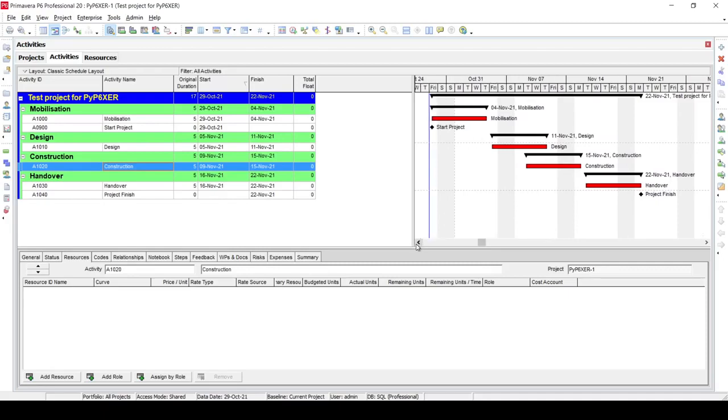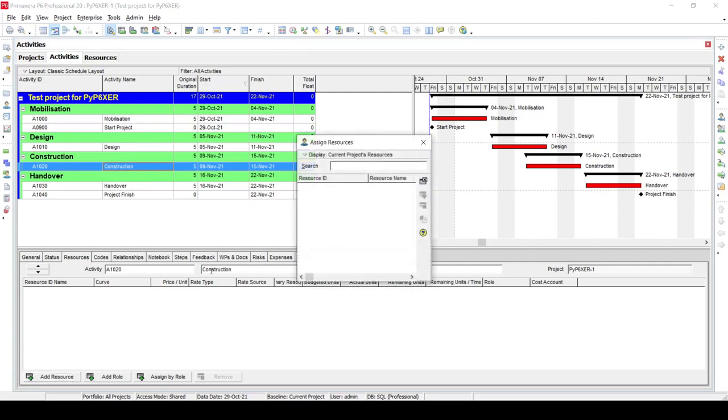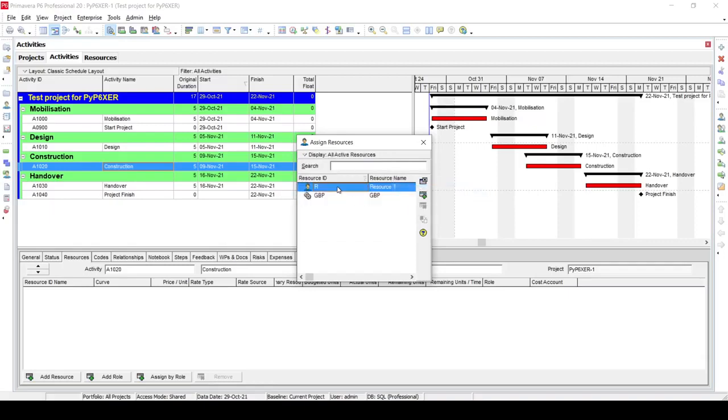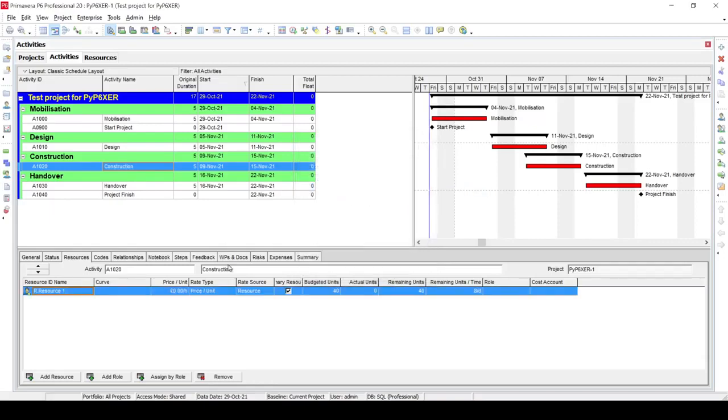After that we need to assign a resource to that activity. From the resources, we just say add resources. I need to remove filters just to show the resources, and I will add this labor resource, Resource One, that I have as a labor resource.